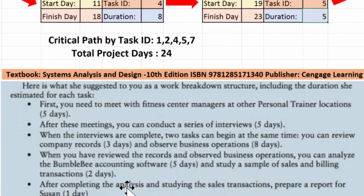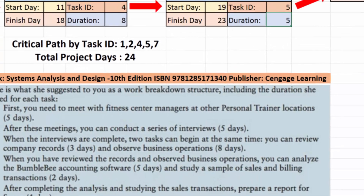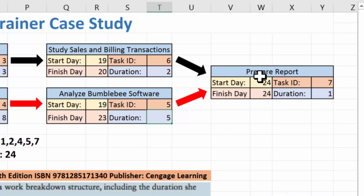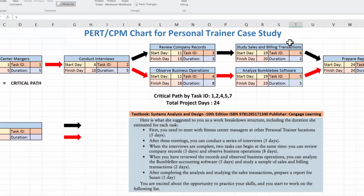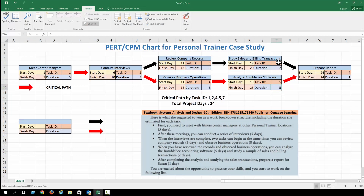After completing both the analysis and the study, we can finally prepare a report. That report takes one day, so the day we start is the day we finish — giving us a total project length of 24 days. The critical path runs through tasks one, two, four, five, and seven. If you rename the tasks so that study sales and billing is task five and analyze Bumblebee is task six, then the critical path would be one, two, four, six, and seven. Hopefully this helps — have a great day.